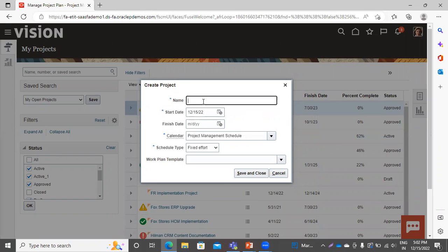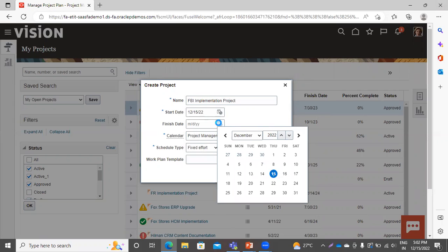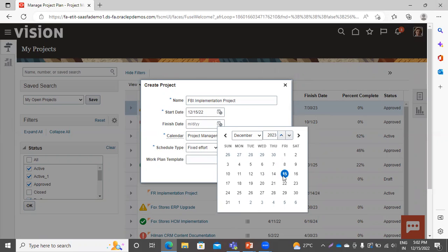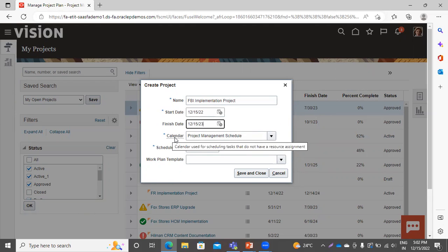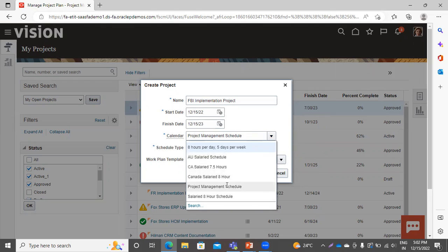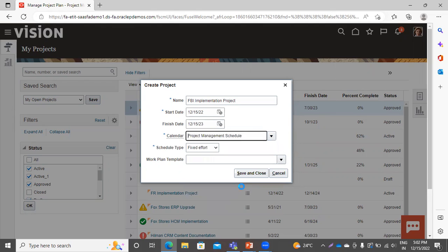Here you have to mention the name of your project. Then give the start date — by default it takes today's date — and give the finish date. This is not a mandatory field, but I am selecting a date one year later. In the Calendar field, you can select from the predefined calendars. I am selecting Project Management Schedule, which is a predefined calendar provided by Oracle Fusion.